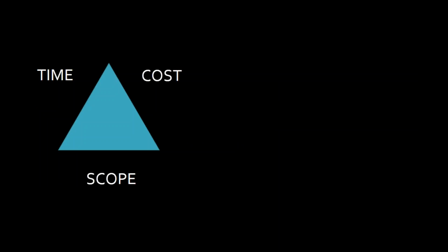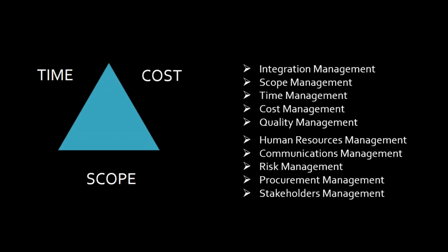Eventually, when we're finished with all of our planning, we will have established baselines, 2 of which we'll measure against once we're executing. That's time and cost. Scope we have to establish, but remember, we're not going to establish officially any of these baselines until all of our knowledge areas have chimed in, that we've done enough analysis of these areas and their effect and their impact on our project before we go ahead and baseline our project. It makes every bit of sense.